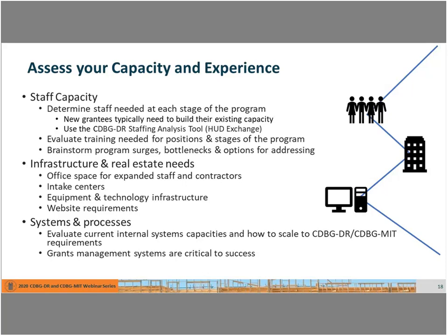So we'll talk more about staffing as it plays into different facets of the program as we go through the webinar. For example, during construction, you need specific types of folks that have expertise in cost analysis, inspection, damage assessment, and that sort of thing, that are different from the types of people you need early on to do the intake and the income documentation and duplication of benefits and award calculations. So thinking through the different program areas, the different phases of your program, and the different parts and pieces of effective program foundation that need to be staffed up is super important.